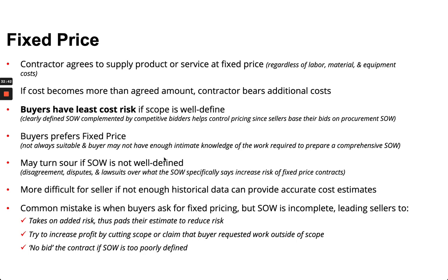But a common mistake is when a buyer asks for fixed pricing but the statement of work is incomplete. That's when funny things happen. Risk, additional costs. We may have to cut things out, reduce quality, things of that nature.